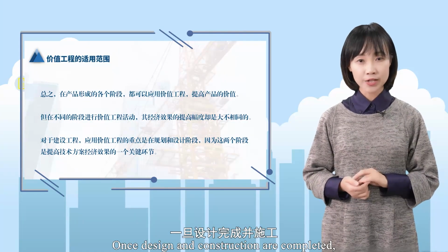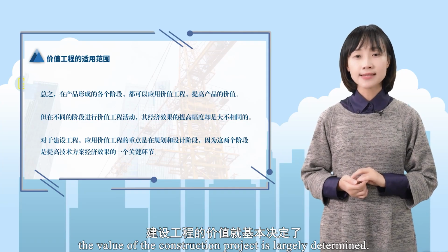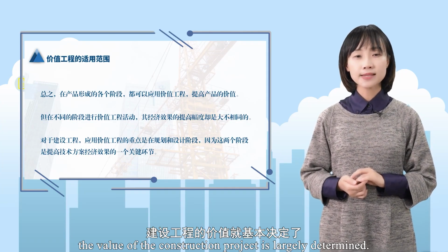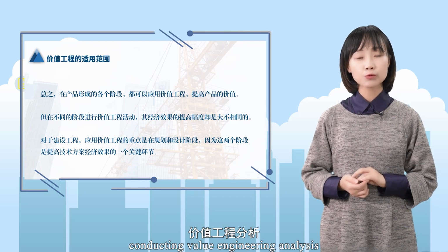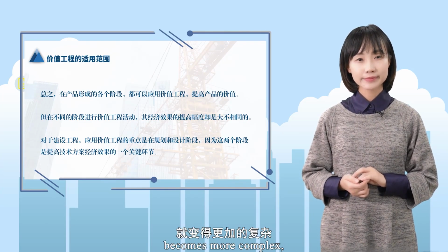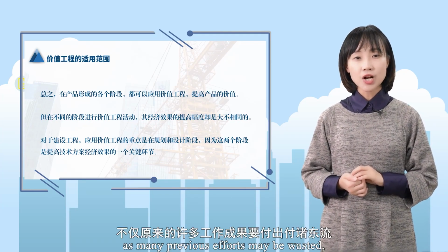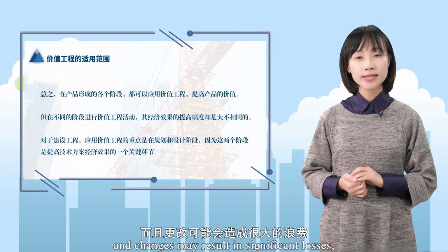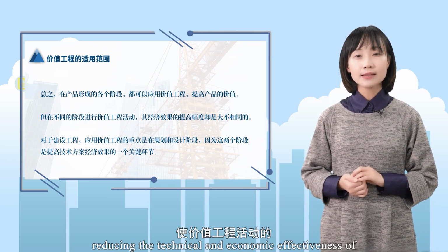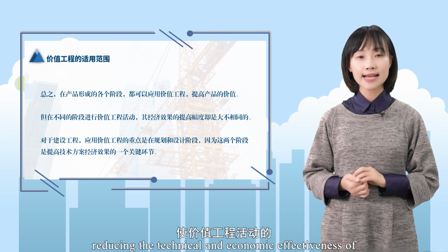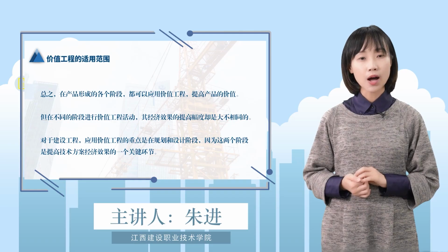Once design and construction are completed, the value of the construction project is largely determined. At this stage, conducting value engineering analysis becomes more complex, as many previous efforts may be wasted, and changes may result in significant losses, reducing the technical and economic effectiveness of value engineering activities.